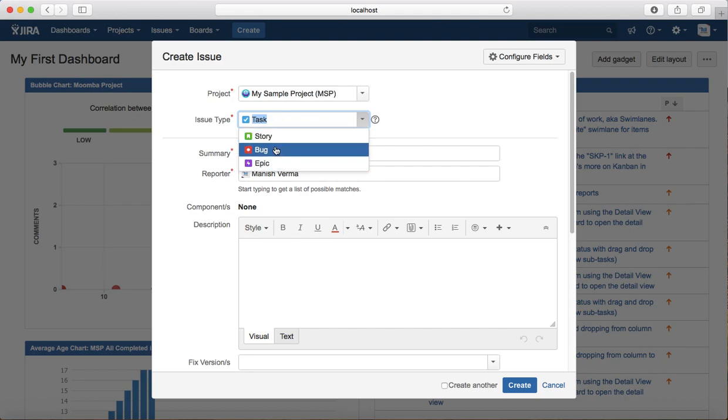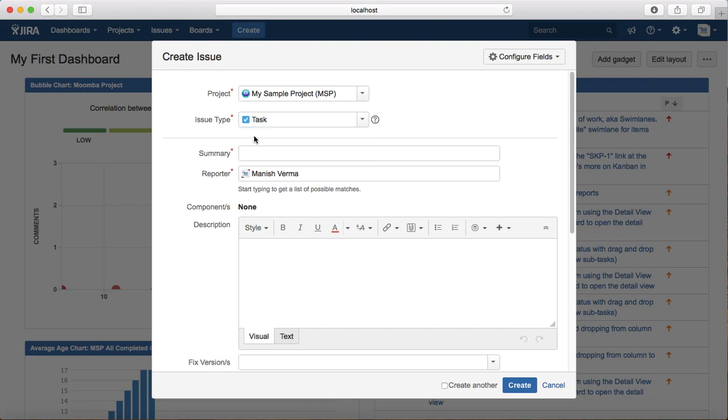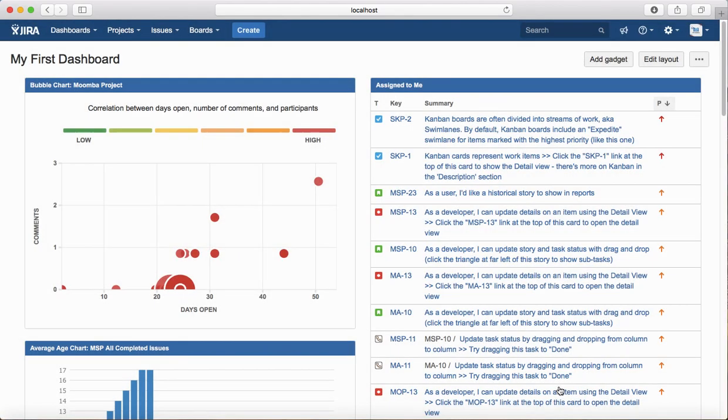If you're using just Jira Core, you will see task and subtask. If you're using Jira Software, you'll see task, story, bug, and epic. If you're using Jira Service Desk, you will see a different set of issues.